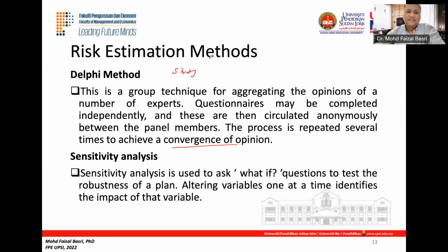Right, and next we have sensitivity analysis. Again, this is based on what-if questions, and usually when we do sensitivity analysis, let's say we are using a quantitative approach, we use numbers to calculate certain, I don't know, profits or whatnot. We try to alter one variable. For example, you change a certain price or certain cost in your estimations, and you will see what the implication is, for example, towards your profit.